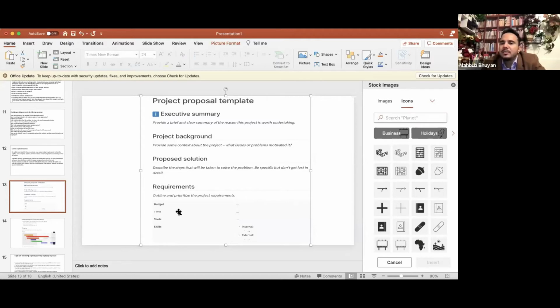So then you have become a product, and for that product, if you have co-authors or some other research assistants, you will include them. So all of them together will be man hour distribution. A day is not 24 hours. You will not work for 24 hours; you will work for 8 hours. So 8 hours into how many people you are working? 5 into 8 is 40 hours. So 40 hours is the man hour. So you will budget on the basis of the man hour power, not by yourself but other people. The whole summation divided by each person, summation of big N by a small n. So this is how you can do this budgetary distribution.